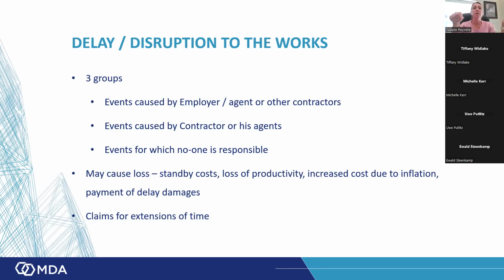If you start seeing changes to the standard form contracts, for example, I've seen in some of the FIDIC, they've deleted all reference to profit, which means that even if the employer is in breach of contract and the contractor has a claim for extension of time due to lack of access, he never actually earns profit on the cost.